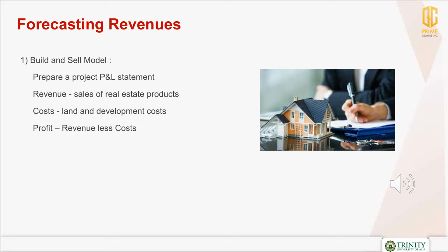Then we determine the costs, both for the land and the development costs. The development costs we were able to estimate from the technical analysis part of the project feasibility study. Then we compute for the profit, which is the revenue less the costs.